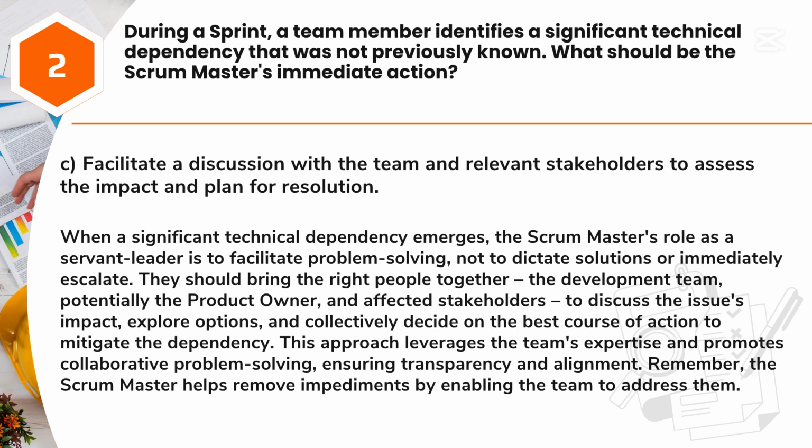Answer: C. Facilitate a discussion with the team and relevant stakeholders to assess the impact and plan for resolution. When a significant technical dependency emerges, the Scrum Master's role as a servant leader is to facilitate problem solving, not to dictate solutions or immediately escalate.